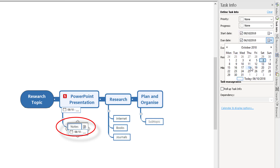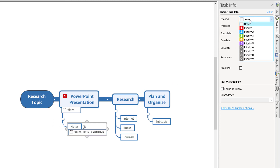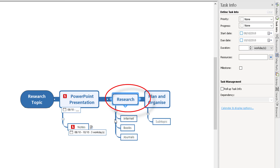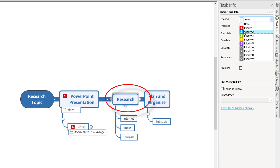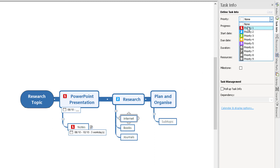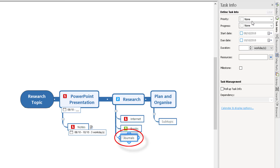It's going to start on the 8th. How long are you going to spend on your PowerPoint presentation notes? Let's say three days — so Duration: three working days. Priority is listed there first so you can move on to your next task. Now going to Research: you need the PowerPoint notes finished before starting research, or you might interleave them — it's up to you. I'll set this as priority too. Internet is going to be my main priority for research — Priority 1 (red). Books I'm not in a hurry for, so Priority 3. Journals, which I can get online, I'll make Priority 2.